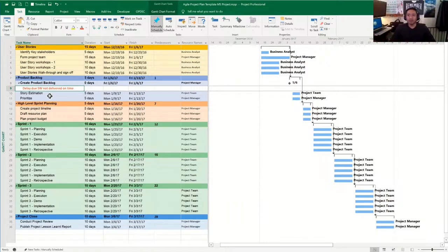Yes, but you also got to question historical artifacts. Has this task been repeated in the past? So you can go back and get lessons learned from it and have that story. Okay, we finished this task in 20 days, but in reality, it's going to take us 15 days. There's a difference. So I would always refer back to previous schedules and measure that against your reality of things.